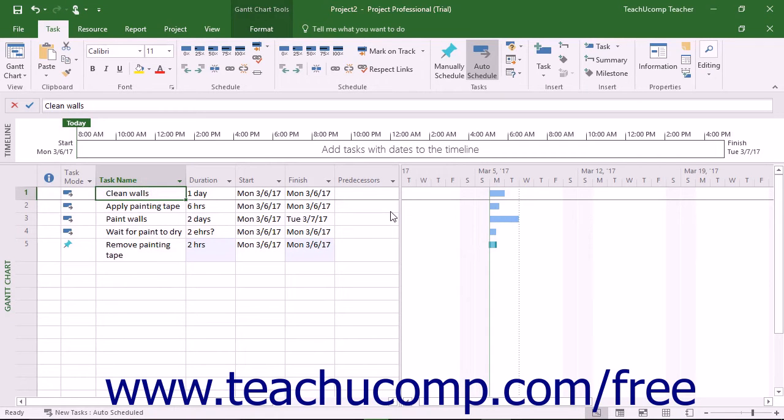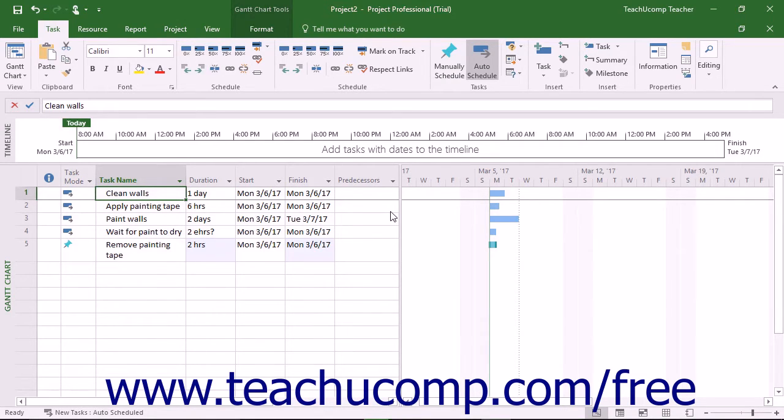Many project tasks share dependencies. For example, perhaps task A must be finished before task B can start. You can model this task dependency using task linking in Microsoft Project.